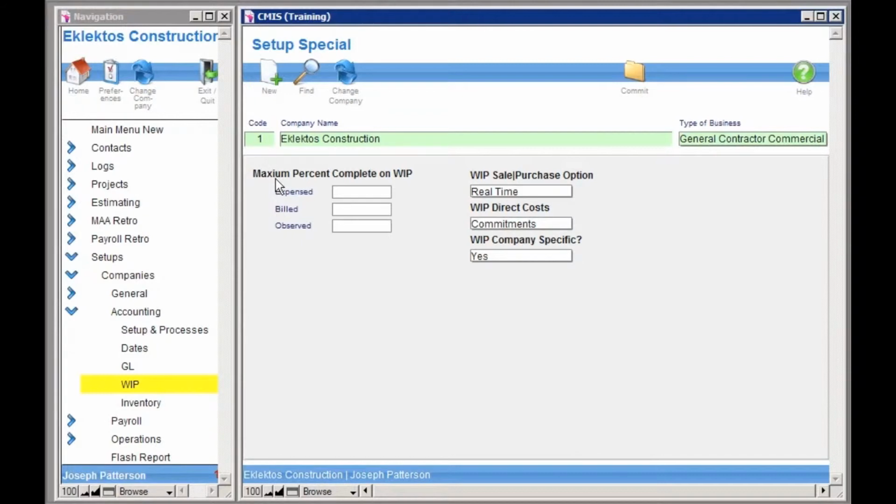And your AP person can put in that invoice, and yes, it warns them and says there's not enough money here, but you go ahead and override that and say, yes, I'm still going to pay that $1,010. Now, if that was the only thing on your expense side of that project, your commitment was $1,000, but what was actually expensed was $1,010. So it's going to show 1% over complete. You're going to be 101% complete rather than 100% complete.